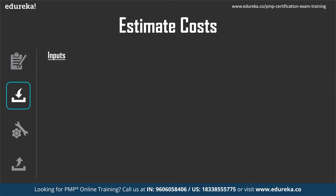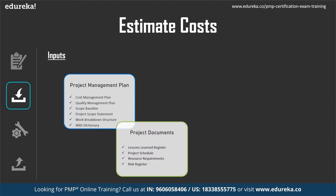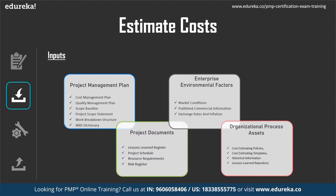Inputs to the estimate cost process include the project management plan (cost management plan, quality management plan, scope baseline, project scope statement, work breakdown structure, WBS dictionary), project documents (lessons learned register, project schedule, resource requirements, risk register), enterprise environmental factors, and organizational process assets.